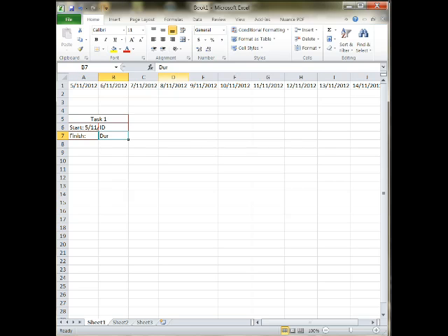Now, let's say we've got a duration of 5 days. Now, sometimes, and the reason I've put days in here is to make life a little easier because sometimes it's just hours. So 5 days on top of the 5th is going to be the 10th. So we're going to finish on the 10th of the 11th.